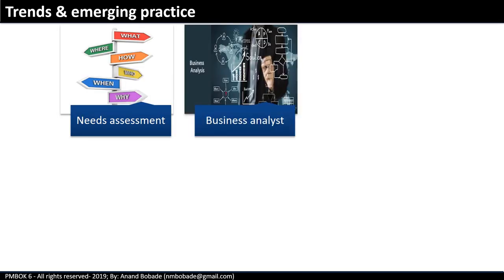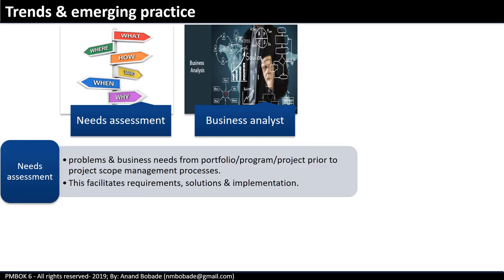Now, what are the new trends and emerging practices in scope management? According to one report, 19% of projects fail, and you may have come across situations where, towards the end, a customer says 'this is not what I requested.' This is where the concept of needs assessment and business analysis helps. Needs assessment is a pre-project activity done as part of program or portfolio planning. It helps in understanding the business problem, establishing the business need, and getting agreement with top management or key stakeholders. Proper needs assessment ensures the project stays focused on original needs and delivers the intended benefit.